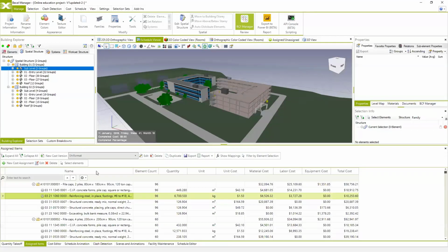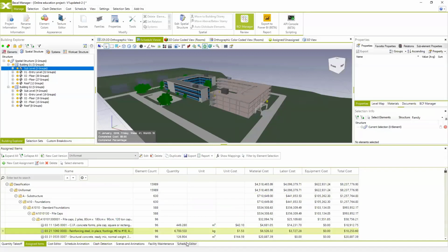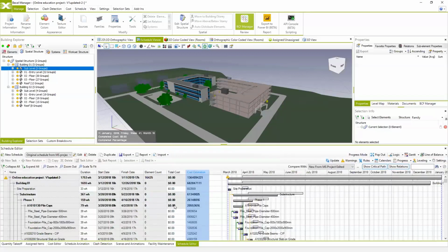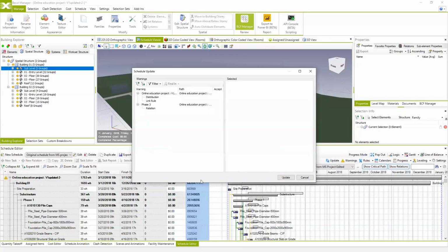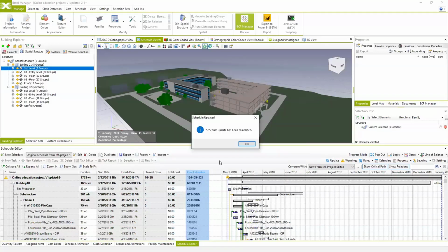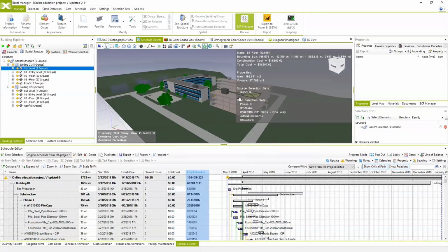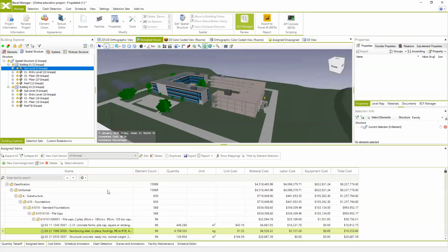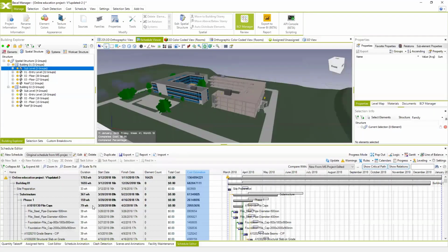And then if you have this cost version right here, you can compare these two cost estimations, but you have to be really careful, because depending on the elements included in the specific cost version, the total cost can be different, because some of the elements which are estimated in the cost version are not related in your scheduled tasks.